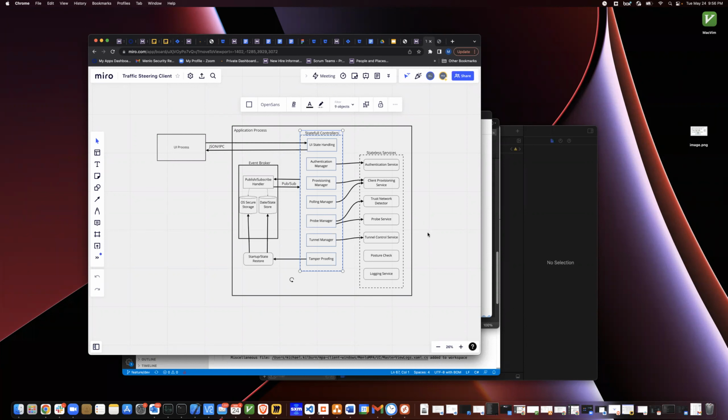Each one of these components, every single thing here, and then go through and just at a very, very high level, try to break down what that particular component has to do, and then write some very high level user stories with it, so that we could say, okay, we can have these three components done, and then determine the order. Okay, we'll do this, then this, then this, then this.